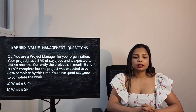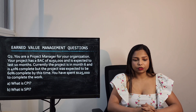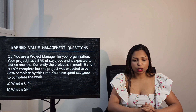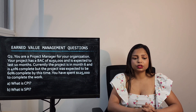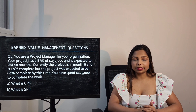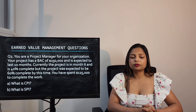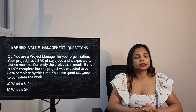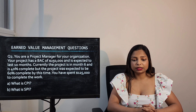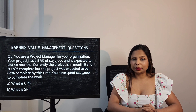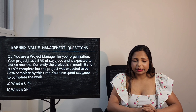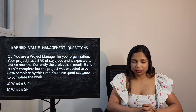Question 2: You are a project manager for your organization. Your project has a BAC of $250,000 and is expected to last 10 months. Currently the project is in month 6 and is 40% complete, but the project was expected to be 60% complete by this time. You have spent $125,000. Calculate the Cost Performance Index and the Schedule Performance Index.